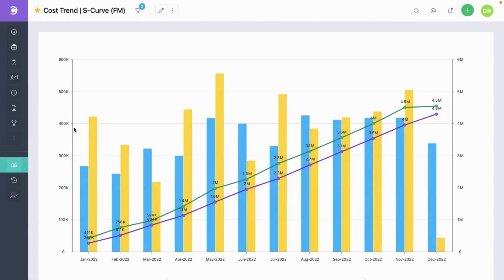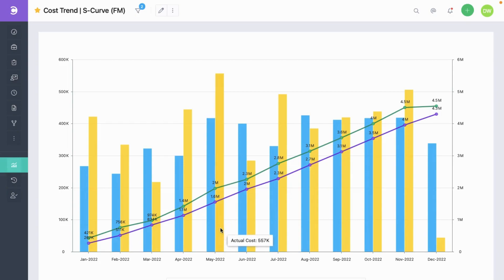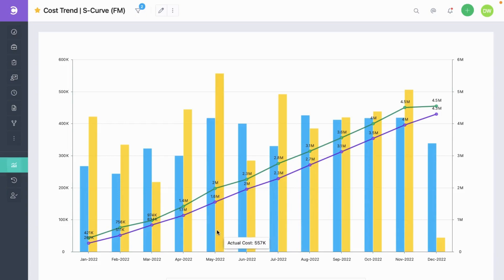Here you can see how you can build your own S-curves. This is the popular cost S-curve. The purple line is the S-curve of the plan cost while the green line is the S-curve for the actual cost. Also, in each month you can also see the plan versus the actual cost represented by these blue and yellow bars.